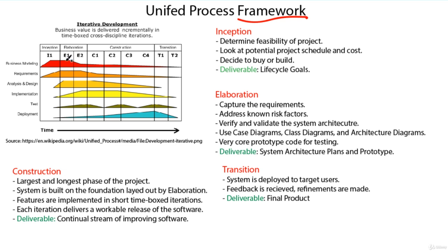And that's important because we don't want to build something that isn't going to make us money in the long run. And this is a great way for risk management. Instead of jumping into a project and spending a whole lot of money, we spend a tiny amount of exploratory money up front and figure out if this is good for us. Once we're out of this phase, once we have an idea, we have some check marks, we say, yeah, let's go ahead with it.